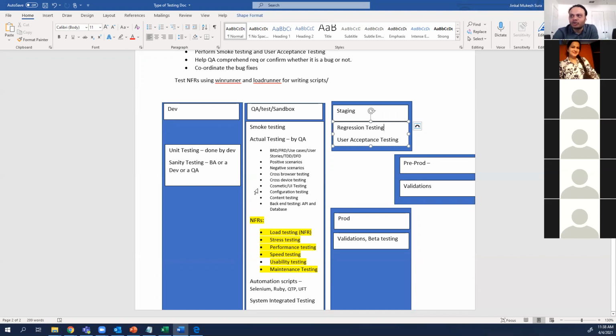The only difference is that in Waterfall, you do this extensively for 3 months in one go. In Agile, you do this every 2 weeks, and you have the last 2 to 3 days of the sprint dedicated for these things. So in Waterfall, you do it all together. In Agile, you just do it in small pieces. But everything that you see here, you still need to do.